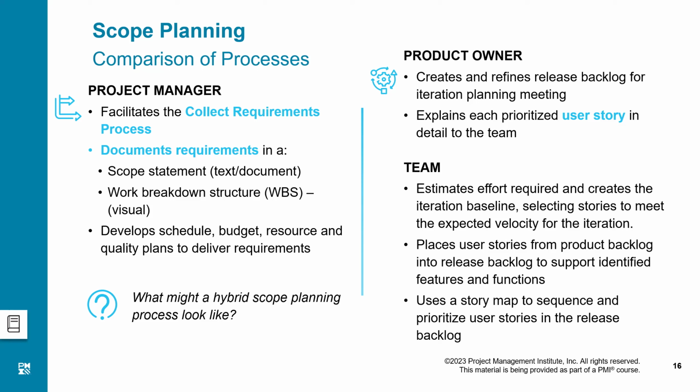The project manager is in charge there. The project manager facilitates the collection of requirements before establishing the scope. Because until the requirements have been sealed, how can we define the scope? How can we develop a scope statement? And if we don't have a scope statement, we don't have the scope of the product. If we have the scope statement, only then can I further break it down into the project scope. So basically, the scope statement establishes the product scope and then breaks it down into the project scope. Project scope is how to do it. Product scope is what to do, right? So requirements led us to the product scope, right? What is to be produced?